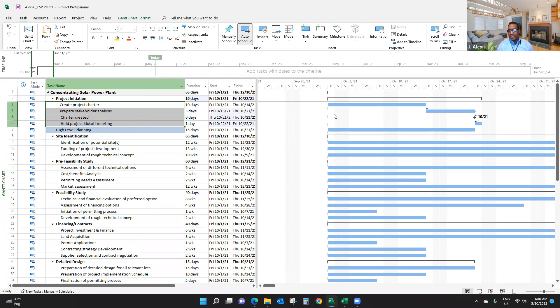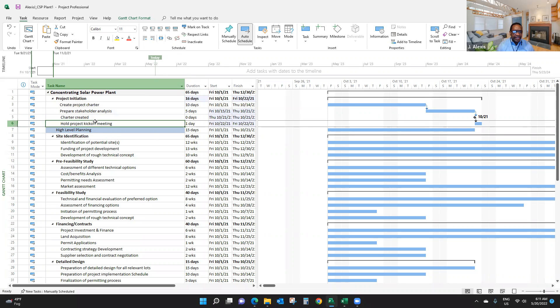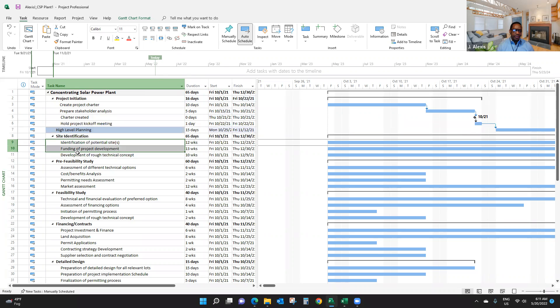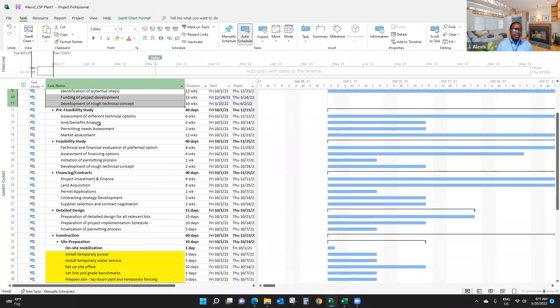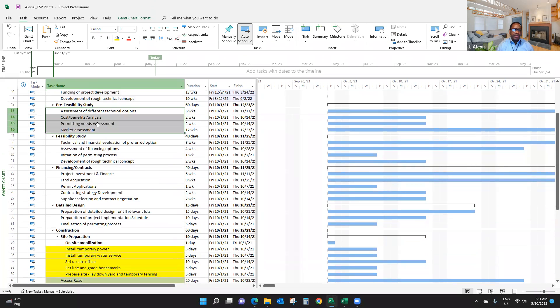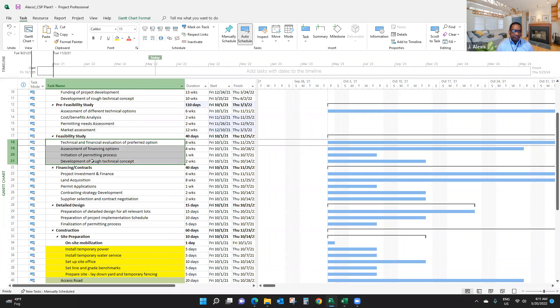Now you can see - if I unlink them, here they are. But when they're linked, you can see the difference, right? I'm going to link this last project initiation activity with the high-level planning. I'm going to link everything, every sub-task. By doing so, I'm linking things by default with a finish-to-start relationship.